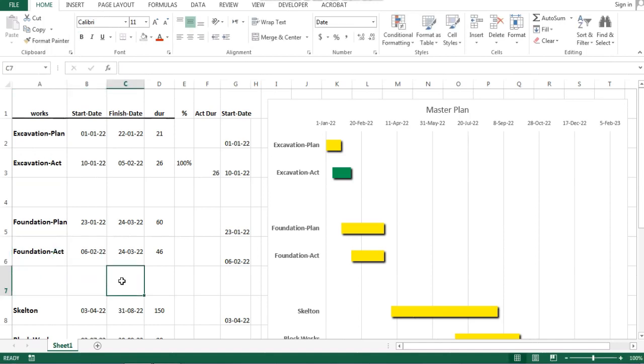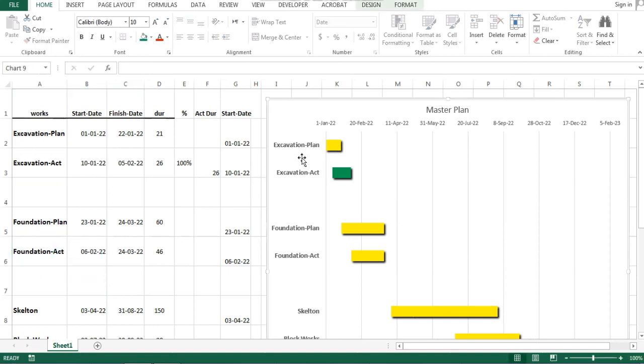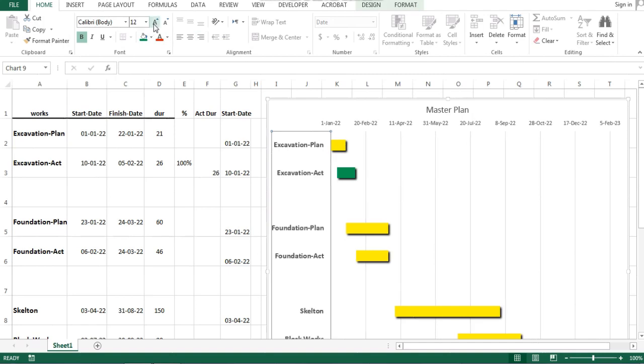Fill cells with the progress data: percentage of completion, actual duration, actual start date, actual finish date.